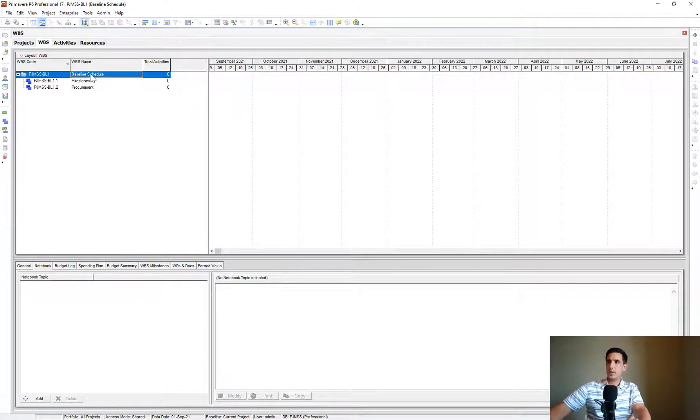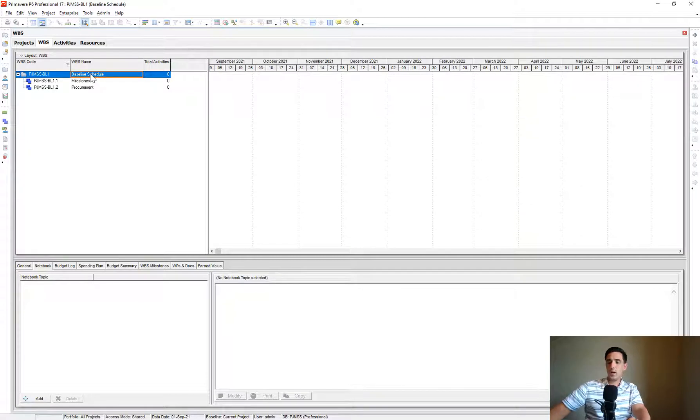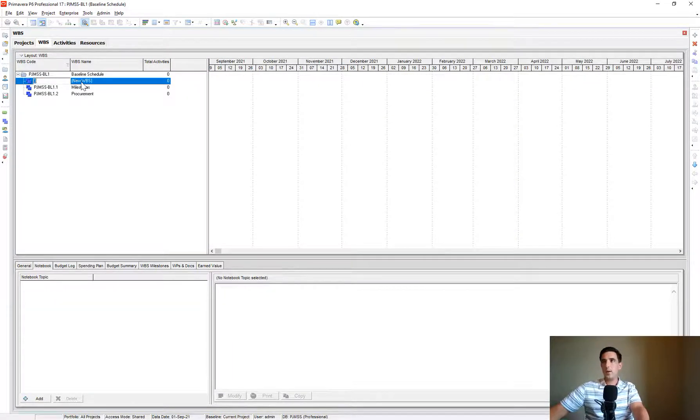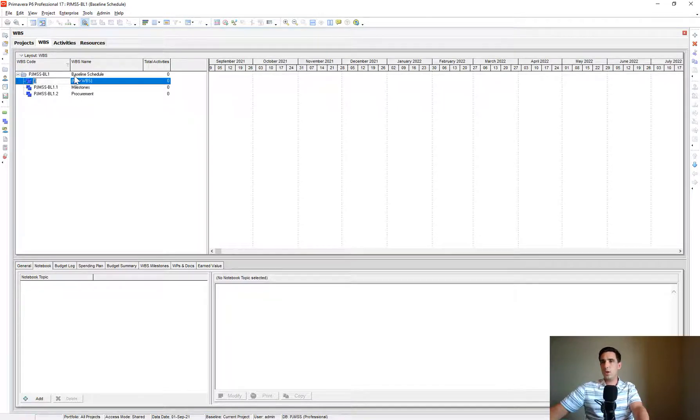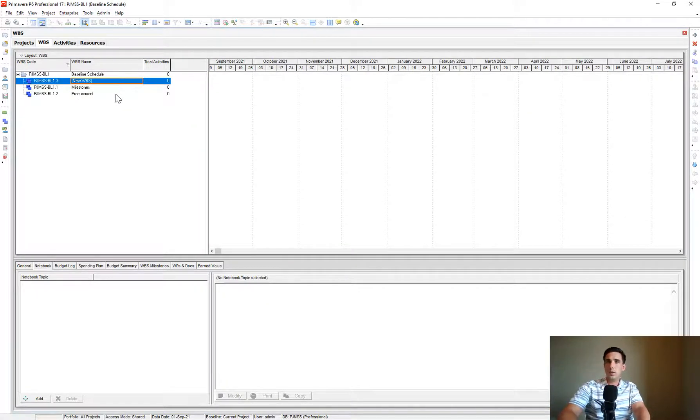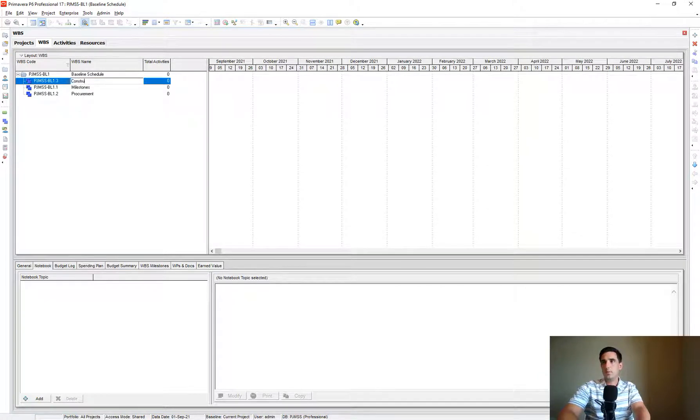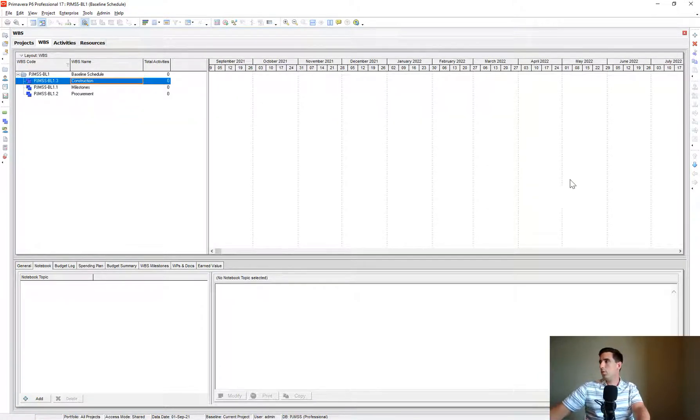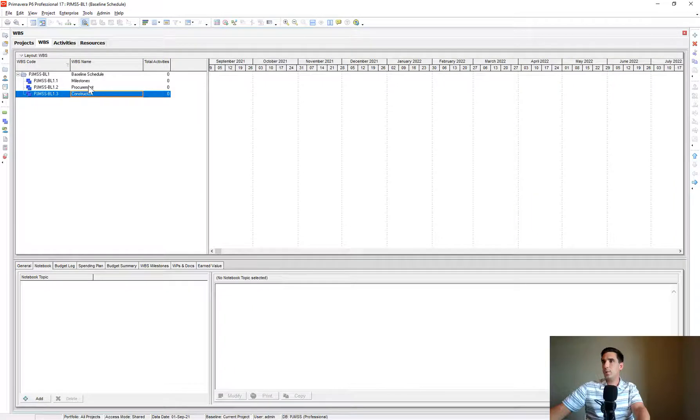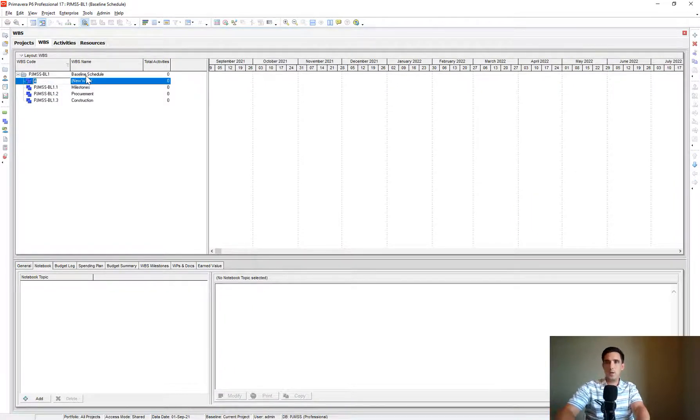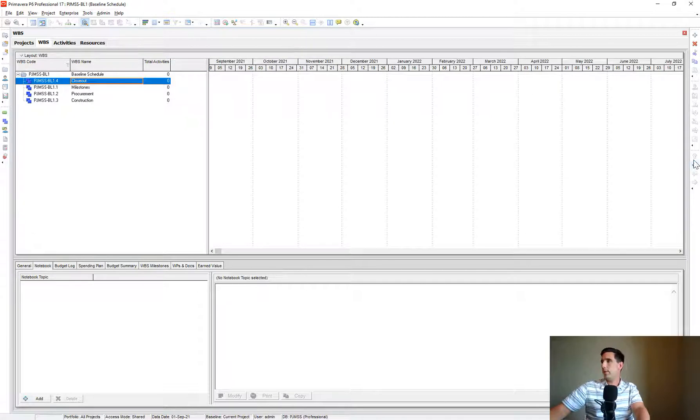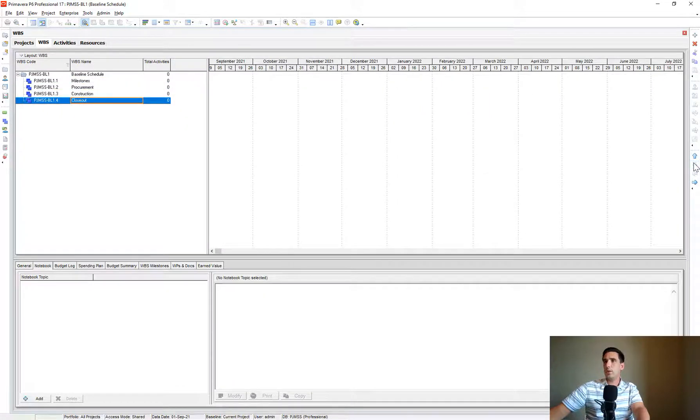Let's add another section. A little shortcut key, if you want, on your keyboard, if you just click the Insert key, that will automatically create a new WBS. So we can do Construction. I'm going to move that down underneath Procurement. And then I'm going to do one for Closeout. And I'm going to move that down below Construction.